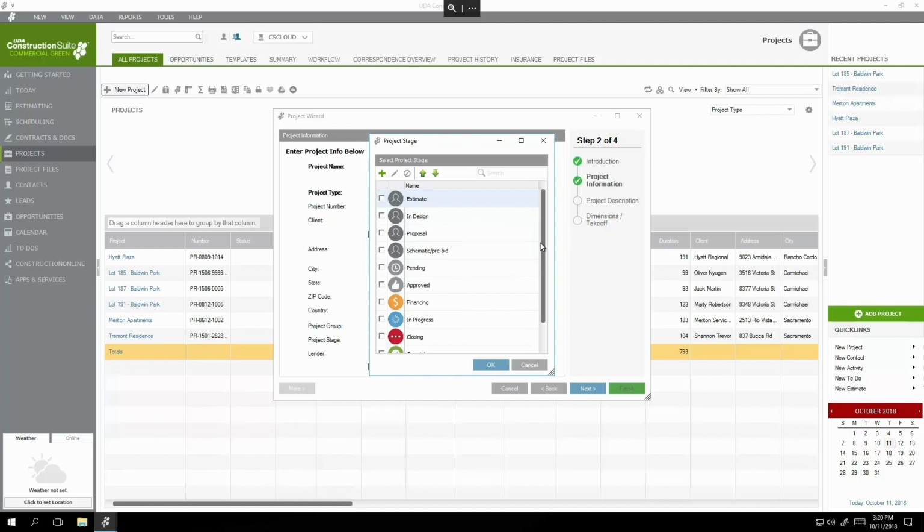that whenever a job comes in for me, the very first thing that I do is I estimate the project. We come up with a ballpark. In that space where we're putting together the estimate of the job, we have some variables in there, and when we take it to design, that's when we start to really kind of focus in. Somebody comes to me and says that they want a 4,000 square foot house with 5 bedrooms and 3 bathrooms and so on. I might put together a quick estimate to find out if they're worth pursuing.